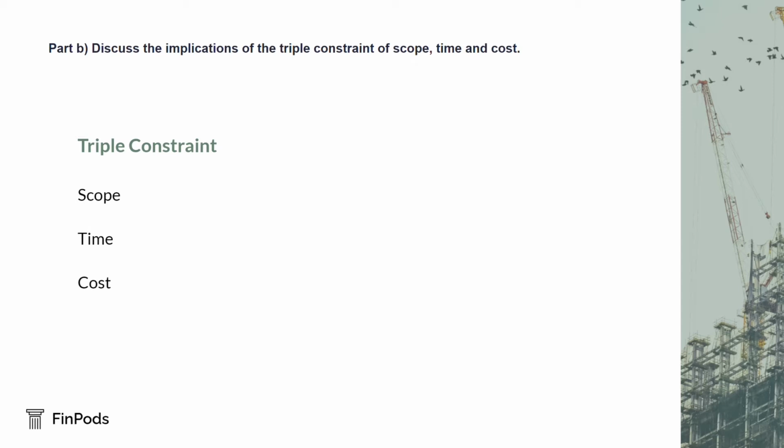All 3 objectives are important for an organisation's management, who want their projects to finish on time, within budget, and to produce the required deliverable. The relative importance of each objective may depend partly on the type of project being undertaken. Where a project is aiming to beat a competitor to market or has a non-negotiable deadline, for example organising the launch of a new product that has been advertised for a particular date, time will be a priority.